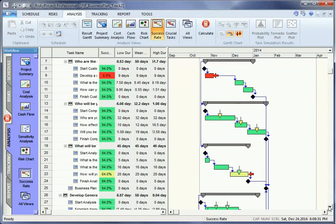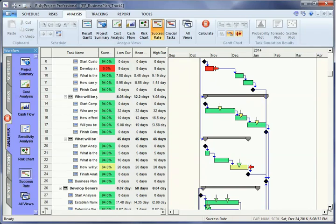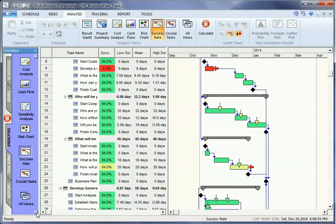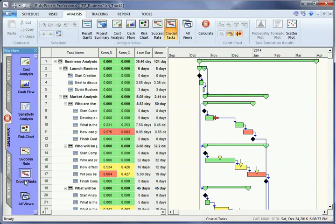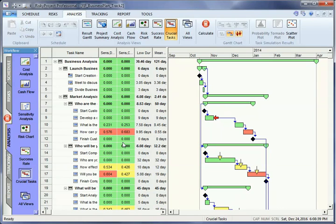Crucial tasks view displays the result of sensitivity analysis on the Gantt chart. Crucial tasks are shown in red.